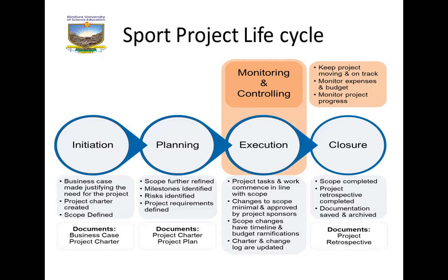So let's say, for example, the first milestone for a facility being built is that in the next 6 months, there must be poles that are erected in the area or the space that has been allocated for the facility. So after 6 months, you will then go and check if those poles are there. If they are there, then that milestone has been achieved.